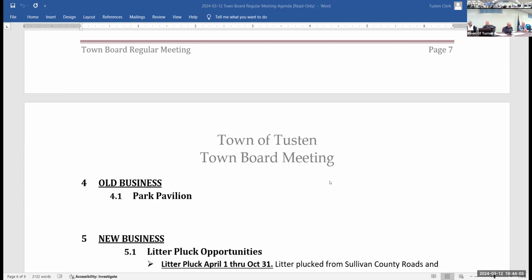He informed me we do need to have a floodplain certificate. So I need to contact the surveyor for that. And other than that, what's a floodplain certificate? Anything that's built in the floodplain needs a certificate of elevation to show the approval of it. That's also for insurance. You'll see it mostly with people that build new houses and such. And then, oh yeah, down in there, having to build it up.